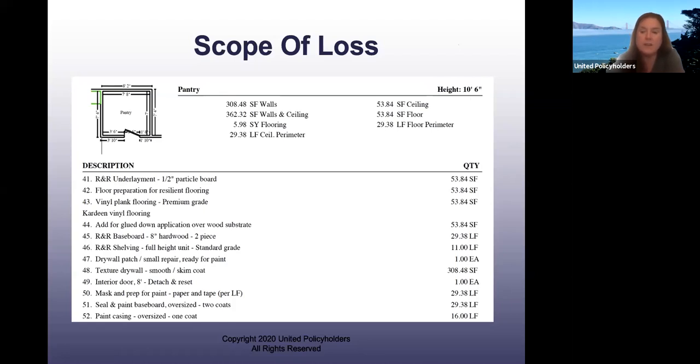And if they don't think about it, they have to change it, either in every room, or they can change it in the whole estimate. Sometimes they forget. It's one of the really common things that people forget. There is a huge difference in pricing of 8-foot stud walls versus 10.5-foot stud walls or 12-foot stud walls. So just changing the ceiling height changes your money dramatically. Okay, so that's the first thing.